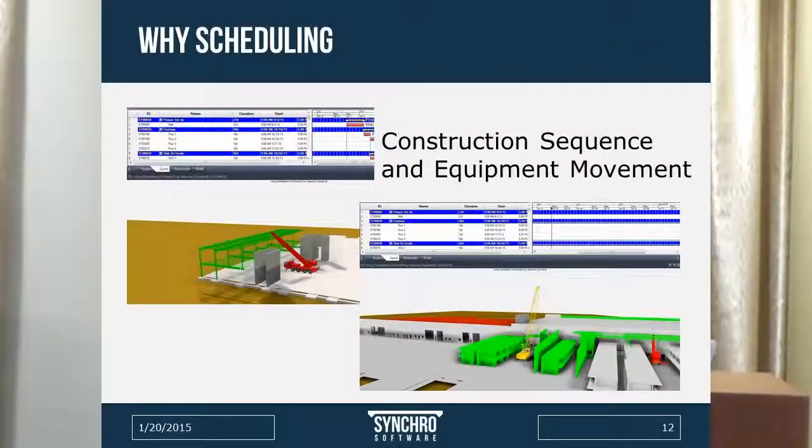Next one. One of the things that I think is the coolest thing ever is you can put equipment into your 4D model and show the cranes moving through how they're going to build the job. Okay? This project right here was a pursuit down in San Diego for a prison. The other contractor had been let go, they were putting it out to bid, and the whole question was, how do we keep these 2 cranes productive the entire time? We're going to have one crane doing structural steel, one crane that's going to do the precast panels, and I don't ever want those 2 cranes to leave. What's our plan? Okay? And so I was able to go in there and draw the little paths and show this.